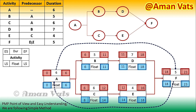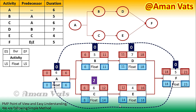We've completed both forward and backward pass calculations. Looking at the values: 0 minus 0 equals 0, 6 minus 6 equals 0, 11 minus 11 equals 0 — the float is zero along this path. The formula for float is late start minus early start, or late finish minus early finish. On the other path, 8 minus 6 equals 2, 14 minus 12 equals 2, 18 minus 16 equals 2 — so those activities have a float of two days.